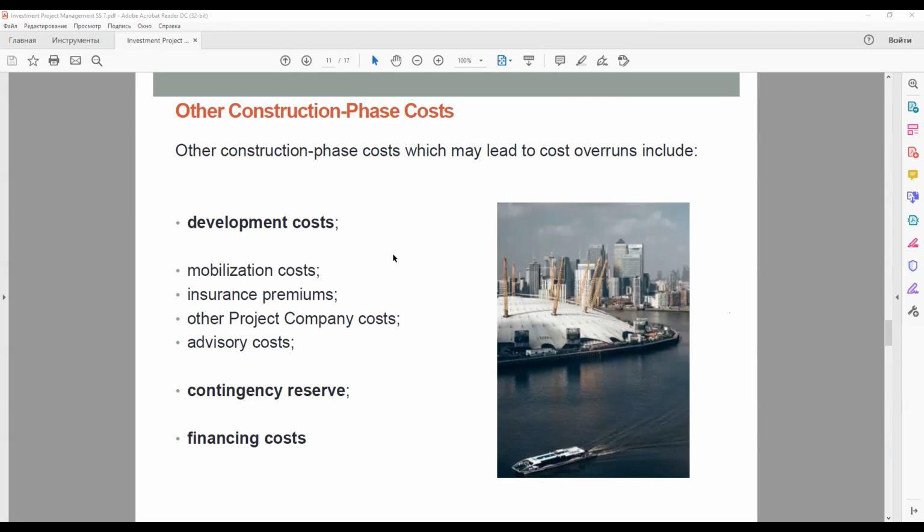And it comes to the contingency reserve. However well managed the budget, there is also always a risk of unexpected events causing a cost overrun. Despite all the risk mitigation set out above, a contingency reserve covered by matching funding is also often required by lenders.